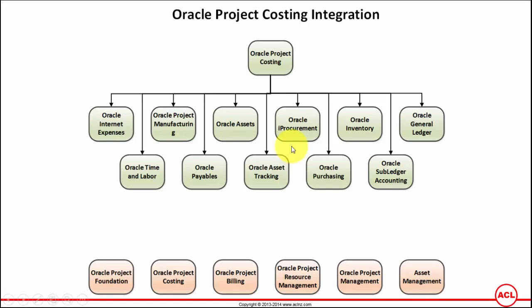iProcurement deals with scenarios such as when, as a project manager, you are requesting a project resource that is an external resource like a contractor. For that, you raise a requisition related to the project, which is used to create a purchase order that is sent to a supplier to get a contingent worker on board. The time and expenses incurred by that contingent worker would be paid by Oracle Payables, but the cost of those expenses would be reflected in Oracle Project Costing.